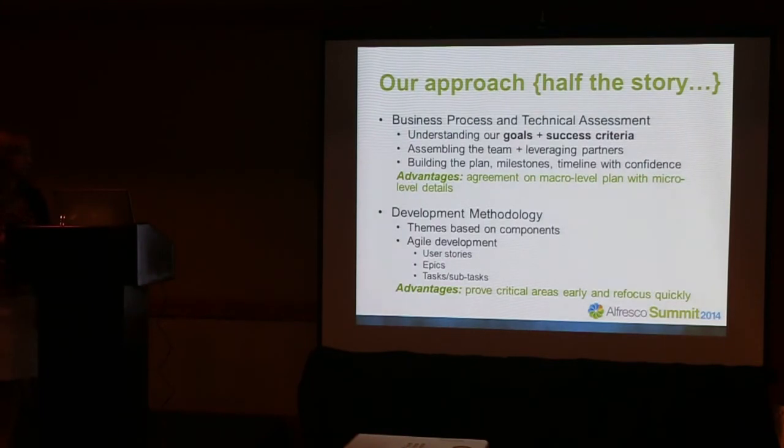The other piece about our approach was something that Vito touched on: we wanted to help them do Agile better. They had pages and pages of requirements. How did we break those down into user stories? How does that become something quantifiable in a sprint that we can go work on? And how does that become tasks and subtasks in the plan?